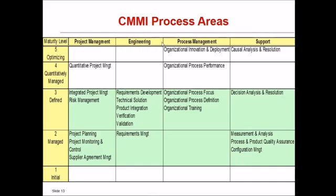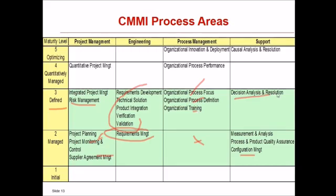The CMMI process areas by level: At level one (Initial), there are no defined process areas. At level two (Managed), project management includes project planning, project monitoring and control, and supplier agreement management. Engineering covers requirements management. Support includes measurement and analysis, process and product quality assurance, and configuration management. At level three (Defined), project management adds integrated project management and risk management. Engineering spans from requirements through verification and validation. Process management adds organizational process focus, process definition, training, and decision analysis and resolution. At level four (Quantitatively Managed), quantitative project management and organizational process performance are added. At level five (Optimizing), organizational innovation and deployment, and causal analysis and resolution are included.